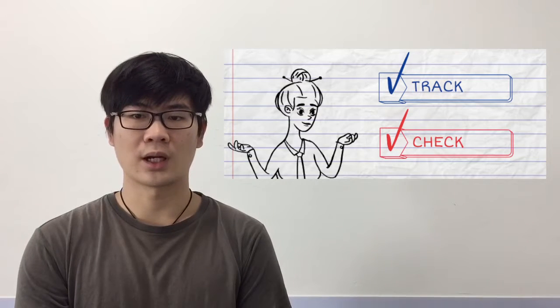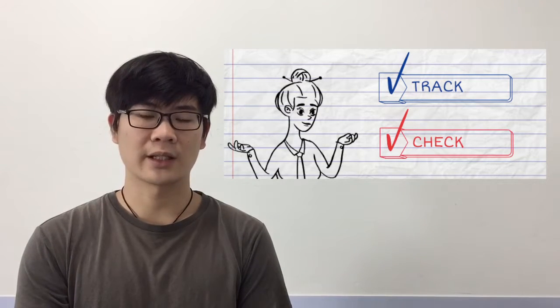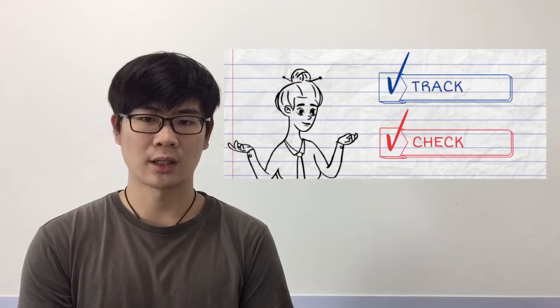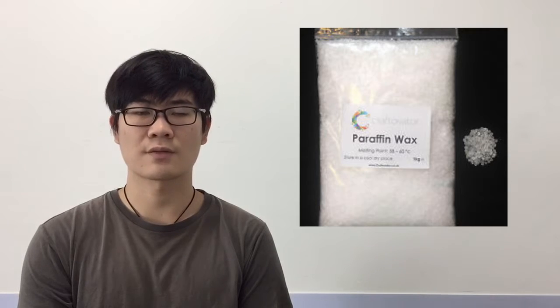During each part of the project, we continuously make sure that what we are doing is related to our project and also according to plan. After each step, we track which step we are on in the Gantt chart. After buying the materials required for the project, we check to make sure that our project is still within budget. There were a few last-minute changes in the project. One was the copper tube, which was originally supposed to be PVC pipes. Another last-minute change was that the PCM was changed from paraffin wax into acetic acid.